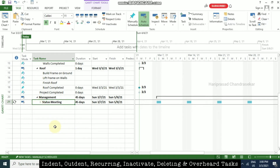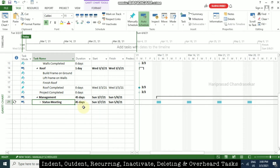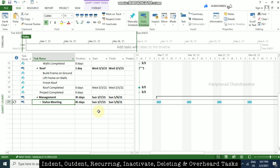Now we will see the overhead task. The term for this is also called the hammocking technique. An overhead task depends on other tasks — its start and end dates depend on other tasks in the schedule. This is called the hammock technique, H-A-M-M-O-C-K, and the duration depends on the start and finish of those other tasks.